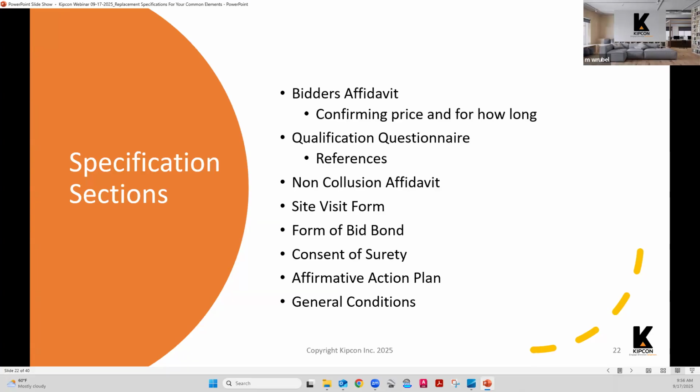There's typically in the contract an agreement that the contractor will not do work, in the case of a multifamily community, incidental side work for unit owners. I've been involved in several cases where a contractor had done side work that was specifically excluded in the contract, that did not turn out well. And so that's a common clause in specifications.